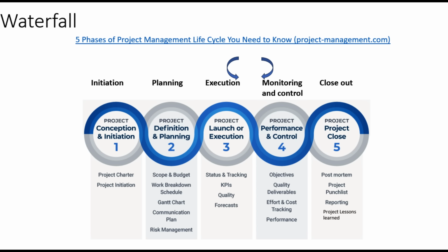After the initiation, the project goes through the planning phase. Detailed planning is done to capture project detailed scope, schedule, and budget. These are called project baselines. Moreover, project risk plan, communication plan, and other relevant documents are produced. After planning, the execution as well as monitoring and control phases start in parallel.